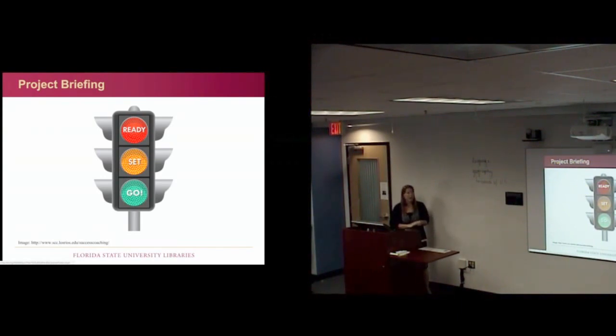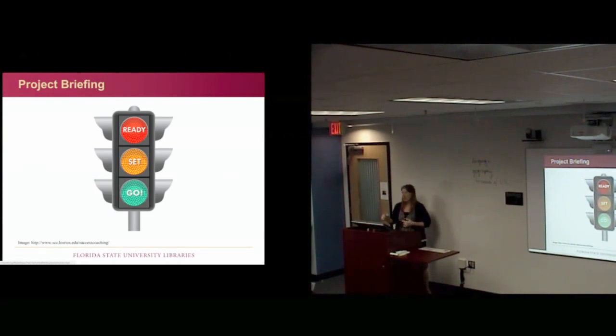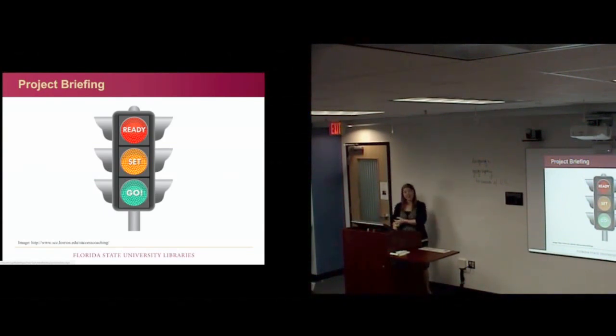I found that really helpful in the DLC so that they have some idea of where their work fits in a bigger picture of special collections and archives. We list out the scope so that they know exactly what is included and what is not included in the project. We list out the major deliverables, which for us is often very clearly stating to all the people on the team what they're called, modules that we're going to use in our digital library, and that often will require them to sometimes scan in different ways. So it's important that they understand that that's a deliverable for them.